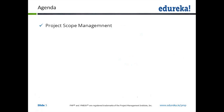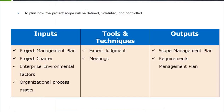We will be looking at project scope management, and the first step is to plan the scope. For planning the scope, the inputs are the project management plan, the charter, the EEF and OPS. The tools and techniques are expert judgment and meetings. The outputs are the scope management plan and the requirements management plan.